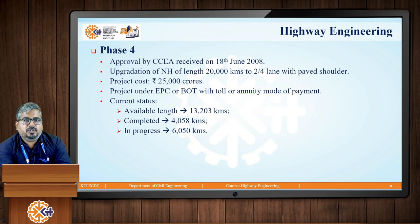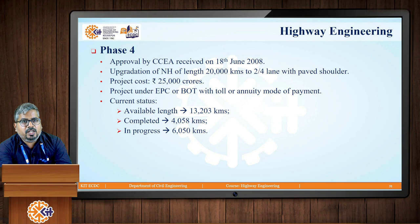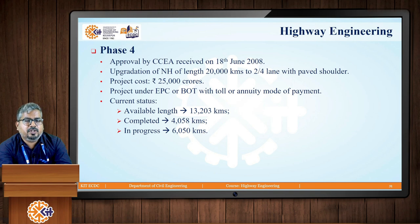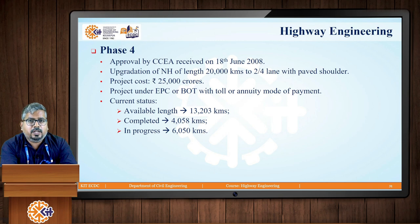Next is Phase 4. In this case, the approval from CCEA was received on 18th June 2008. The main aim was to upgrade national highways of a length of 20,000 kilometers to a two-lane or four-lane highway along with paved shoulders. The estimated project cost was rupees 25,000 crores. The projects under Phase 4 came under the EPC or BOT with toll or annuity mode of payments.